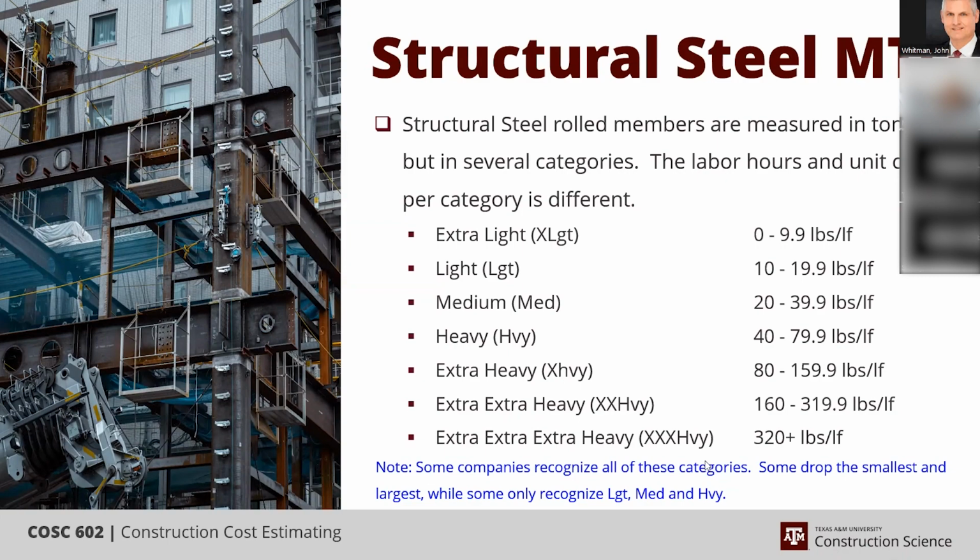The same principle of cost is applied that is with the labor. Give me one example. A lot of miscellaneous steel runs in the 4,500 to 6,500 per ton range. Your light and extra light is similar. It can run in the 4,500 to 5,500 range.